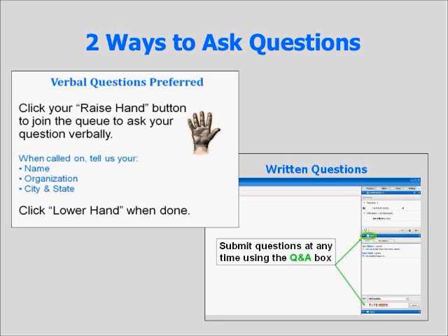Okay. And you need to be thinking about, is this reasonable based on the market? Are there things they're trying to include in overhead that are part of the total development cost, or is their overhead too high? Is their overhead reasonable, consistent with the market? Right. And again, I think someone mentioned it earlier, when they're nonprofits, they're just barely getting by. And so how do you substantiate, and of course you would have to look at an allocation timesheet, I would guess, to get a sense of how much staff or overhead is involved with this specific project over other projects that they may be involved in.